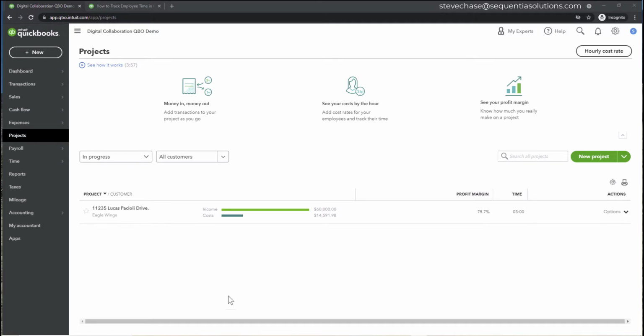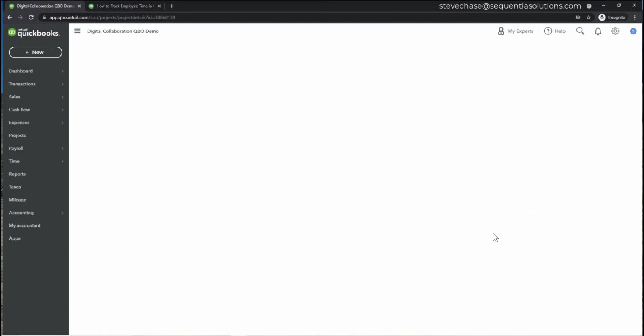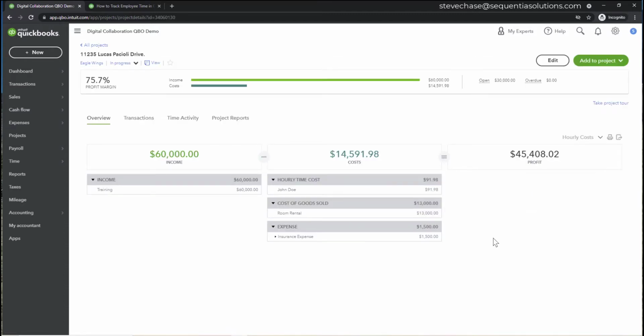So you can see here that I've got my first time entry of 3 hours here. A couple things to note: first of all, you might have a QuickBooks payroll subscription, and that includes the time tracking. For your employees that have costs, what's nice is you can have an employee that shows the total cost of the wages that you pay them, plus the payroll taxes the employer's paying, and any associated overhead costs that you'd like to have associated with that.